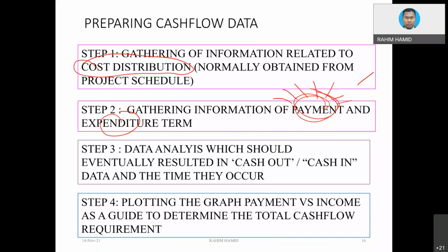When it comes to manpower, the cost that you will incur, the cost almost immediately lah. Meaning to say the first month you already have to pay people salary, you cannot hold on. But in the case of some of the material, if for instance you are working with certain supplier and certain supplier give you certain credit, you don't have to pay immediately, isn't it?